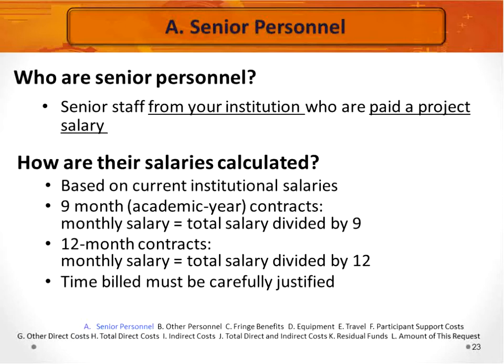It is important that the amounts you budget for an individual align with institutional salaries or pay rates for that individual. An individual may not be paid more or less than the standard or normal institutional compensation for that individual. Do not budget or plan for an individual to receive from the institution more than 100% of a full-time salary for that person. This is an important point because of a great grief among community college faculty, because it means that while working on a grant, no overload pay may be received for teaching an extra course or doing grant work during the academic year.